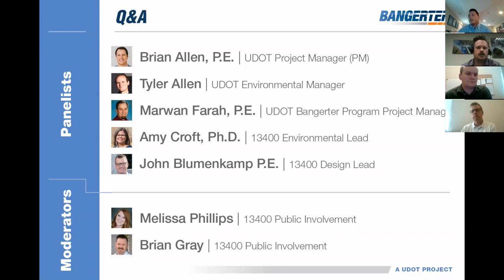Okay, question for Brian. When is construction anticipated to begin on this interchange? And I believe we can also ask for 98th and 47th. Construction is anticipated to start in 2023, with right-of-way acquisition to start after the completion of this environmental document, which is early 2022.